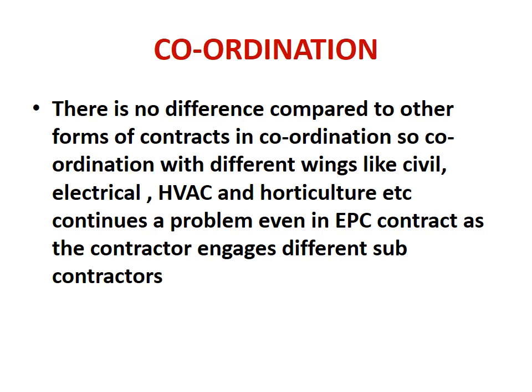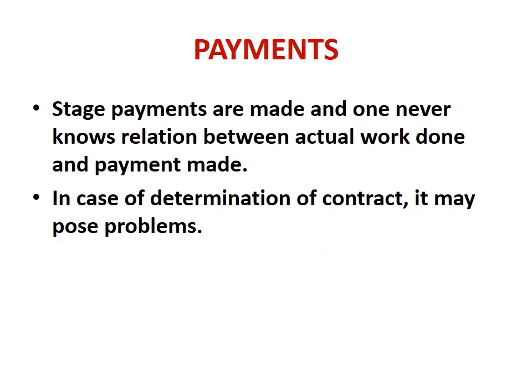Coordination may be required for civil, electrical, HVAC and horticulture, etc., which may be components, parts of the contract. If that is a problem, it will continue to be a problem even if an EPC contract is there, because normally the EPC contractor also engages different subcontractors, so this problem remains.